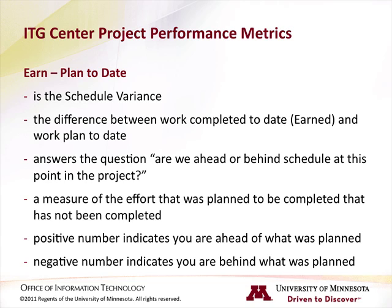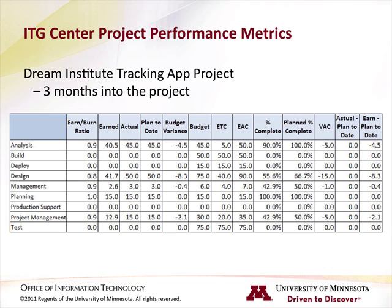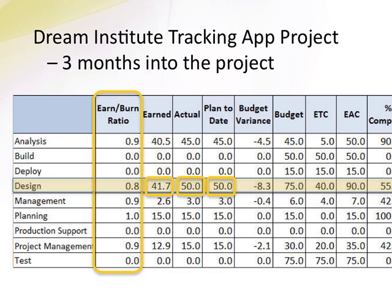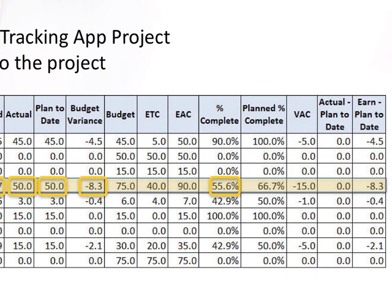Let's see an example of these metrics in the Dream Institute Tracking App project, which is now 3 months along. We can see that the earned-burn ratios have gone down a little bit on a couple of the activities, indicating that not as much is being accomplished as was planned. Looking specifically at the design activity, actuals versus planned to date look good. However, earned is a little bit lower — remember, if everything is going according to plan, earned should equal actuals. Looking at the budget variance, we see a negative value, indicating they are spending more time to accomplish the work than they had planned. Percent complete versus planned percent complete also shows a difference, indicating they are not quite as far along as they had planned to be at this point.